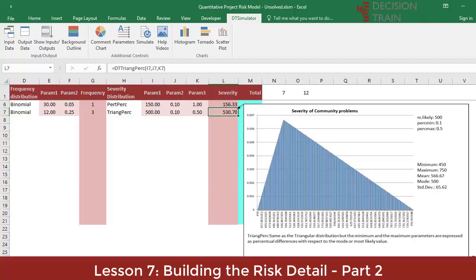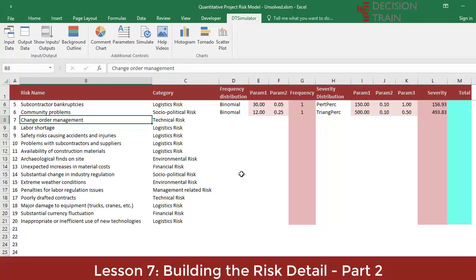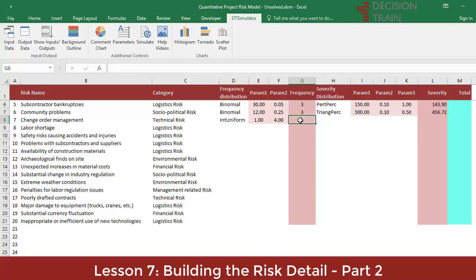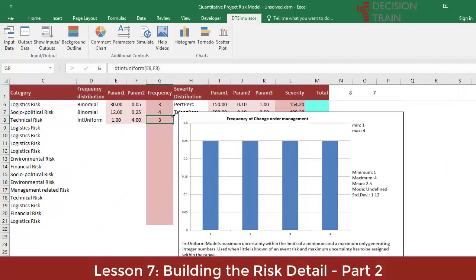We will see one last risk, the seventh. We believe we have already shown the methodology well enough for the change order management risk. Assume the expert is unable to assign anything less than maximum possible uncertainty — any number of events between one and four change orders could occur with the same probability of occurrence. For this reason, we use a uniform integer distribution, int-uniform, which assigns equal probability to integer events between minimum and maximum values inserted in cell E8 as -1 and cell F8 as 4.